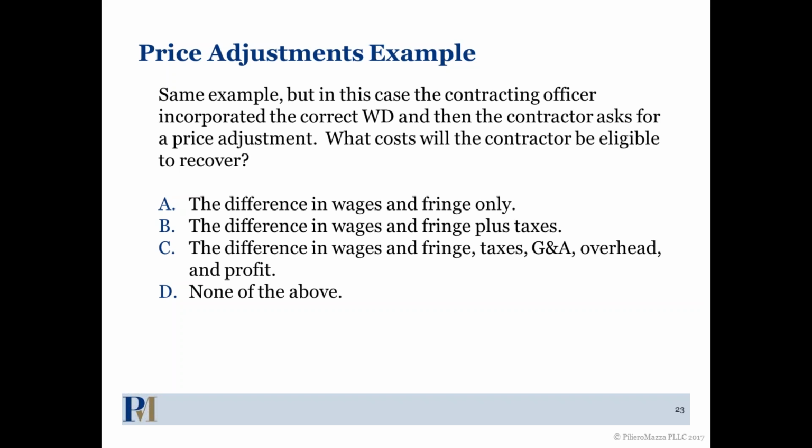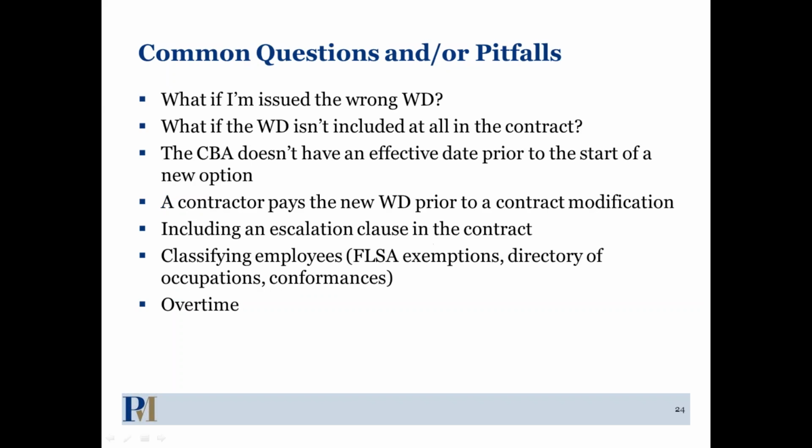The other thing I'd caution you about is certain contracts that require bilateral modifications, right? So there are certain contracts that require bilateral modification. In those cases, be careful, because you don't want to waive any rights to a price adjustment. So if you get a bilateral mod, make sure you have all of your money taken care of in that mod, or you have some way in that mod to request your money later, because you don't want to waive those particular issues.